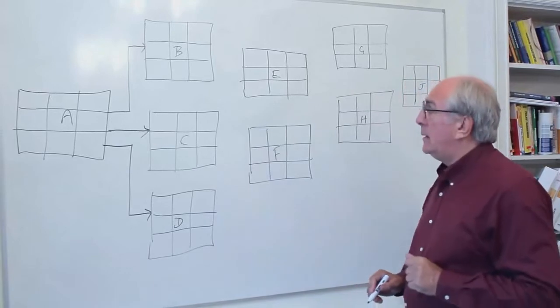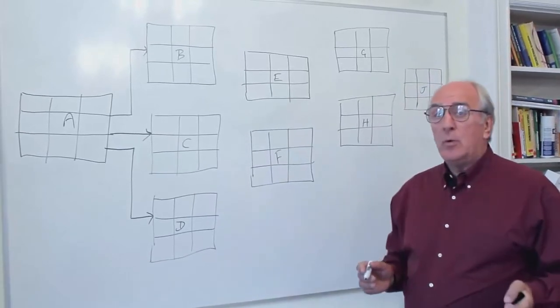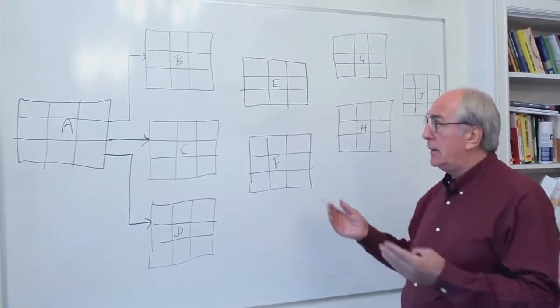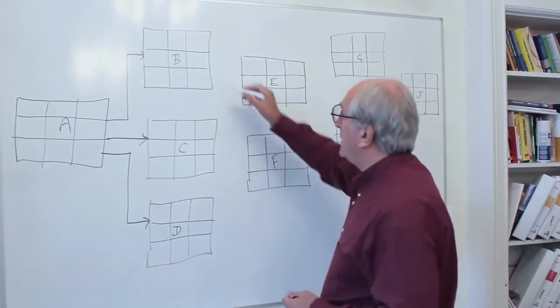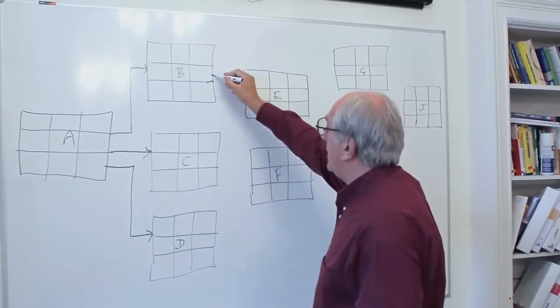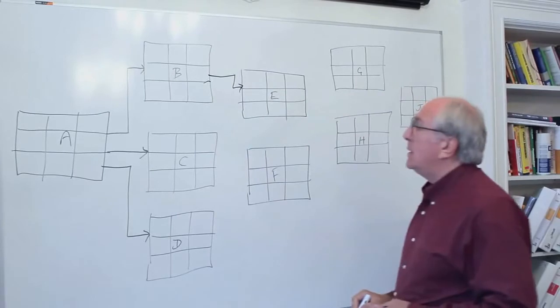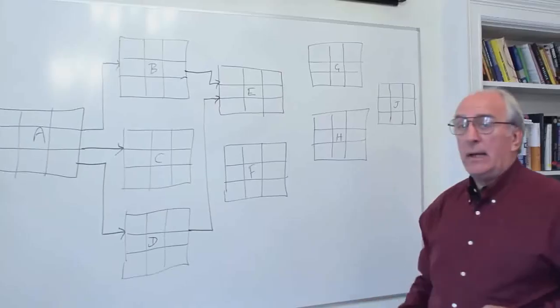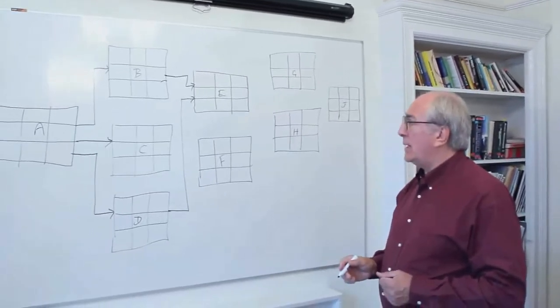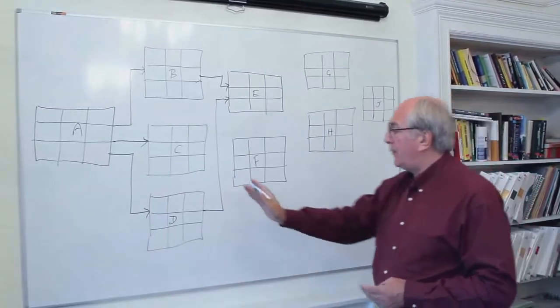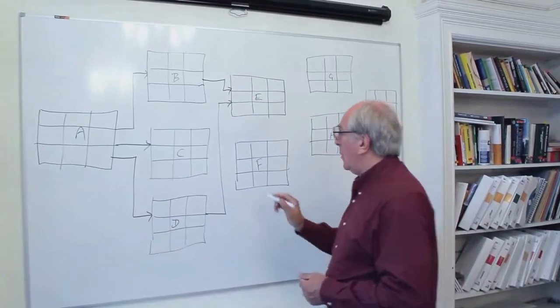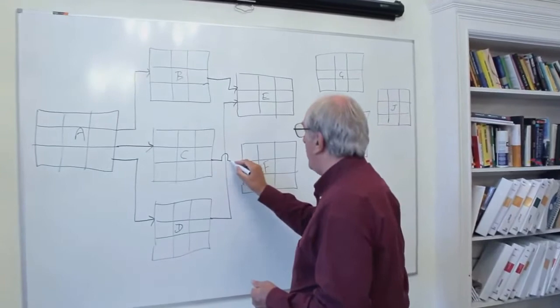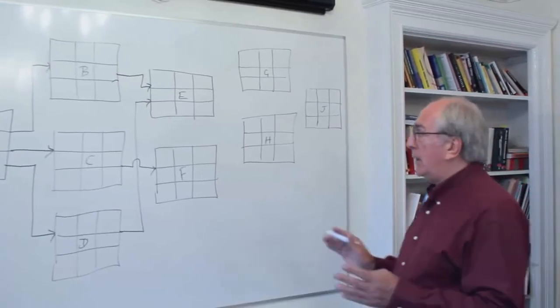That's how that works. And so we can go on from there in a slightly more complex logic, if you like, and this technique is used for building enormous projects. So let's say that we cannot do E until B has been completed, but we also need D completed before we can do E. And you can see I've drawn that relationship, that constraint, it's sometimes called, or restraint, from D to E. And it's the finish of D and the start of E. And we'll also say we can't do F until we've completed C. Okay, that's what we got so far, building up this logic.